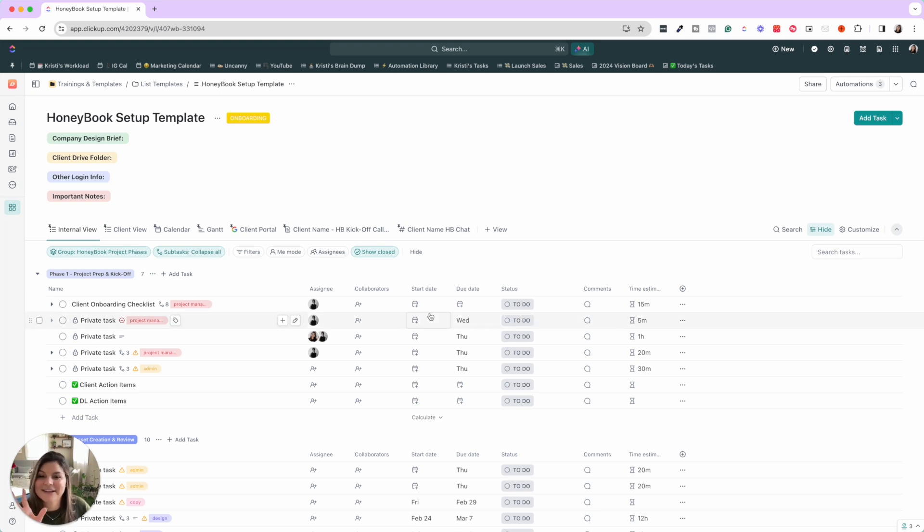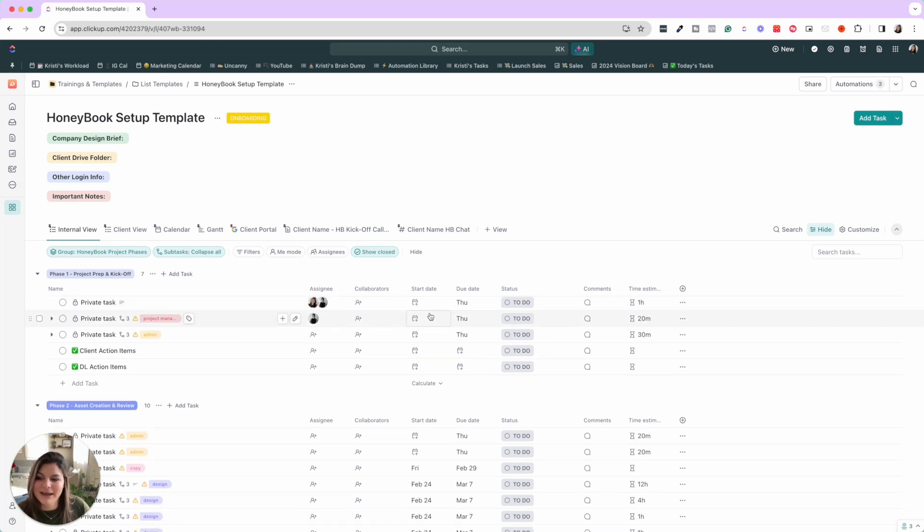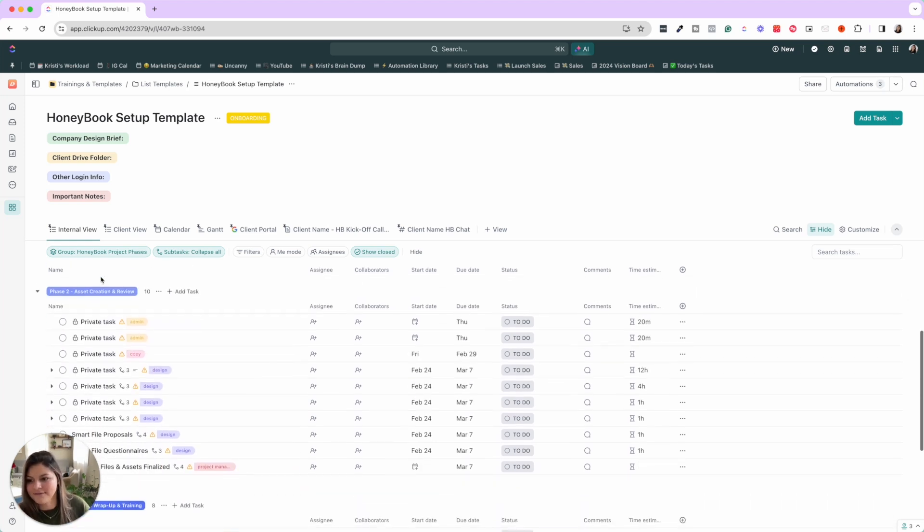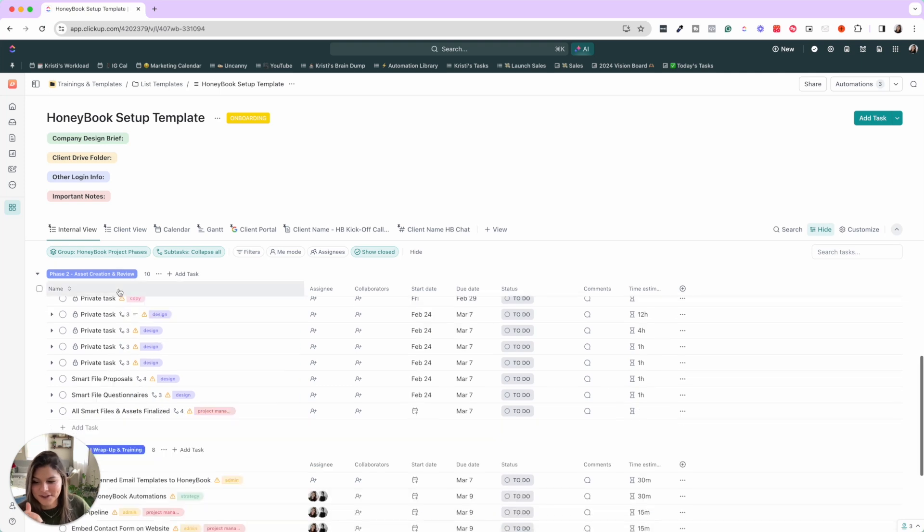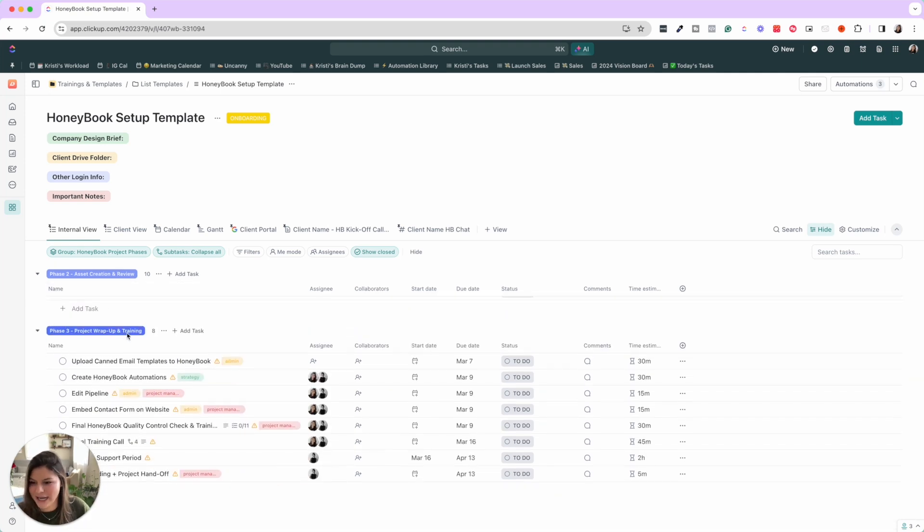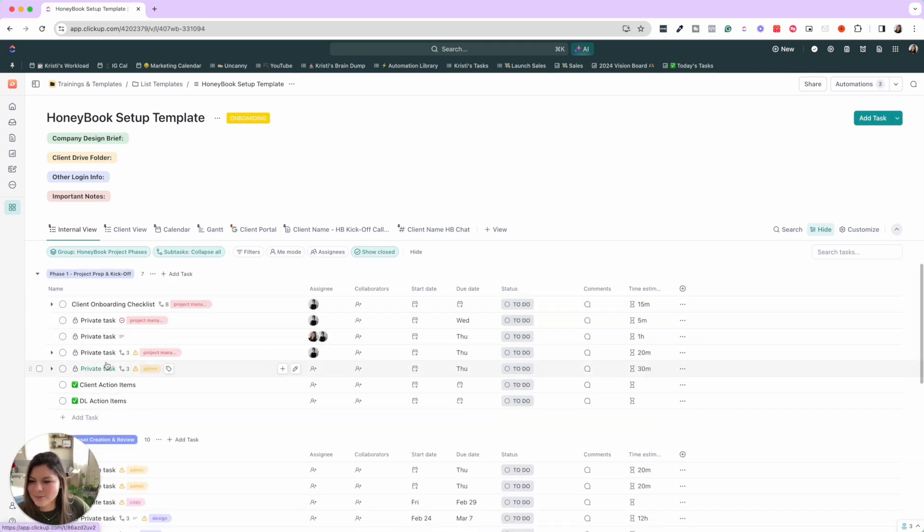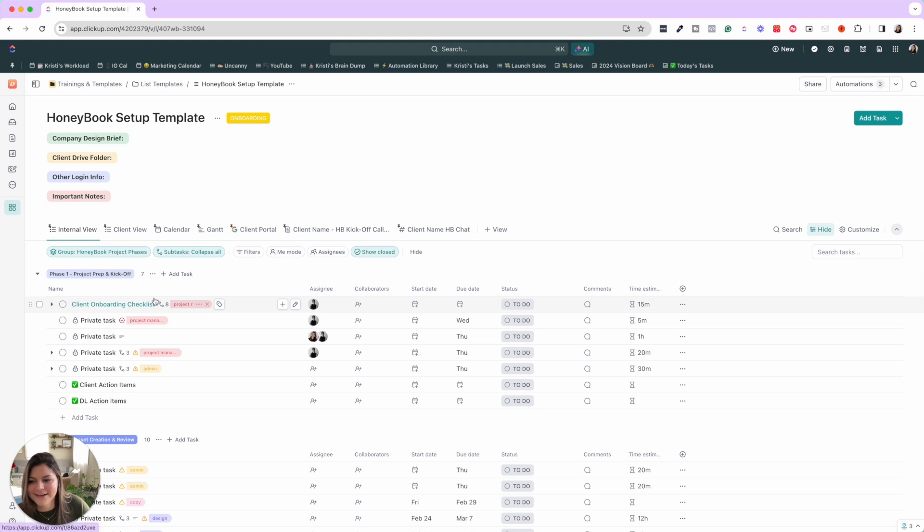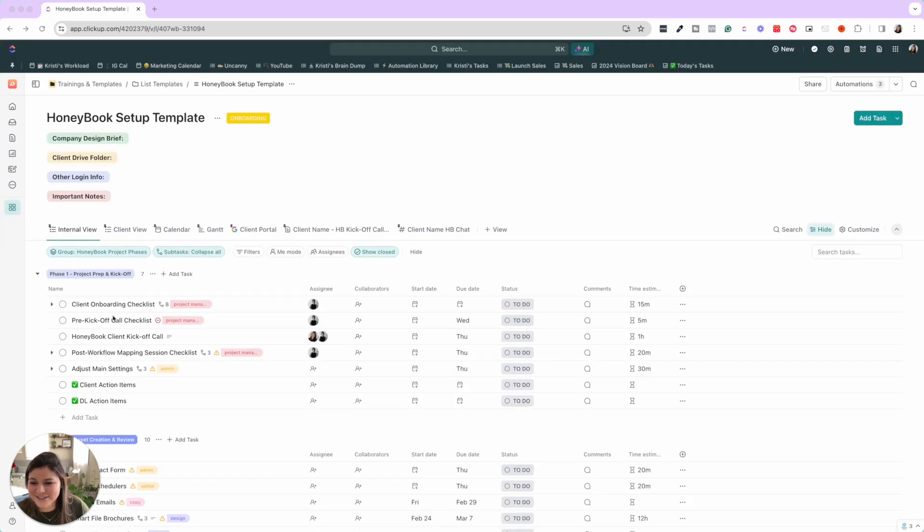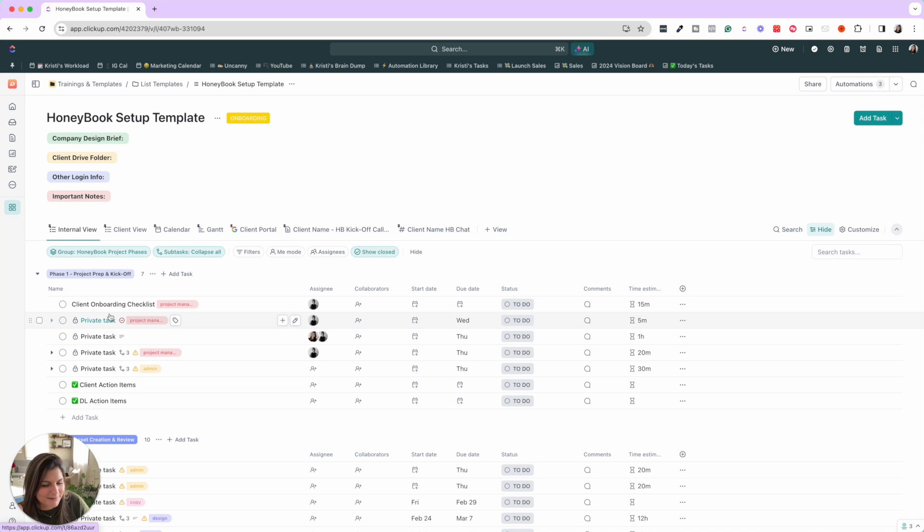And then on the internal view, we have three main phases for HoneyBook builds. We have the project prep and kickoff, the asset creation and review, and then the project wrap up and training. These are privated because ClickUp is dealing with a bug right now that when I add a list template, it will just make them privated tasks. Let me see if I can refresh this and you can see it. Okay. So you can see it for a second. It's probably going to go back to private in a second, but you'll see it was prep for kickoff call, post workflow mapping session, wrap up, adjust settings, etc.